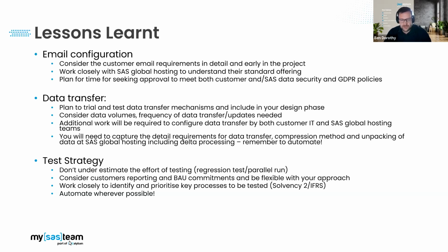The other area is around data transfer. So we had quite a large volume of data to transfer from the on-prem environment to the cloud. And that was a full historic load of data. So we spent a lot of time, in parallel with the code migration phase, trialing and testing the different data transfer mechanisms to work out which was going to be the best solution.